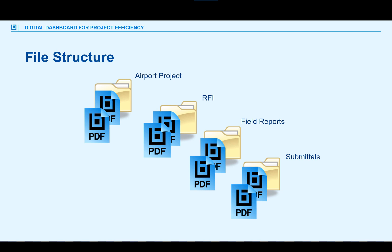This is especially important if you are in the design phase or construction phase, for a couple of reasons. First, we want to make sure that as we're building and maintaining that dashboard, we know where each file should be saved. Second, a digital dashboard has tons of hyperlinks connecting icons to specific files or folders. If we are not consistent with saving those files or if we move files around, we're going to run into the pain of having broken links, which will delay your project if your team can't access files. So think through the file structure and naming convention consistently to avoid broken links.